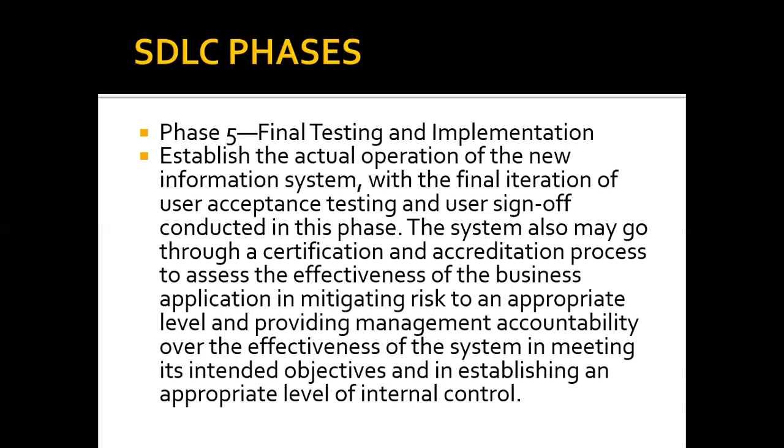But you can do parallel cutover. You use the old system and the new system for like 2-3 weeks or more, a month, depending on management decision. Then that 3 weeks or so will be used for the users to acclimatize to the new system, while IT is verifying that transactions at the back end of the two systems are synonymous before we retire the legacy system finally.